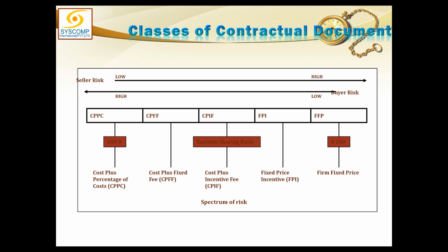And why are we paying it? It is the cost of my time. If I had made it myself, then it would have been just 4 crore rupees. So the 2 crore is the premium I am paying for this insurance which I am getting from my contractor.